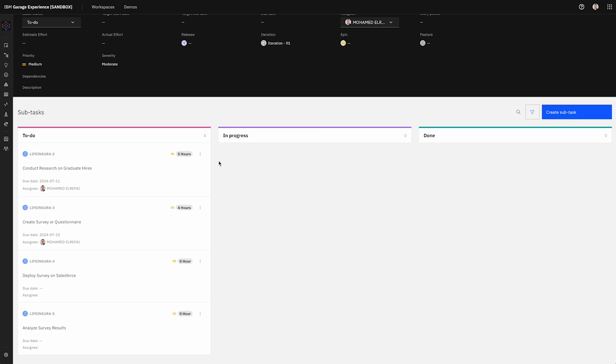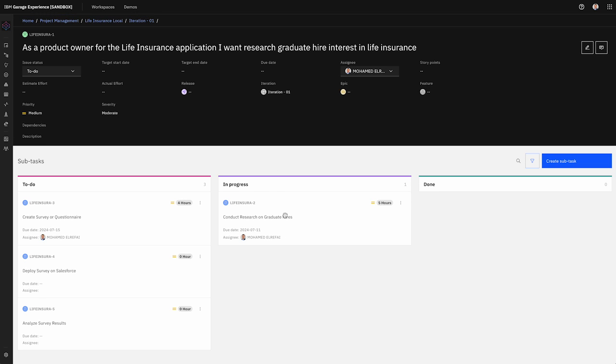So once we have this and we assign all the user stories, basically when you do daily stand-ups, the different members of the squad are either taking user stories or activities and tasks and assigning them to themselves. And then they're also updating the progress. So if I start to work on something, I'll put it in progress. And if I'm done with it, I'll put it in done. And that's how the system will start tracking progress and how things are happening throughout the system. Again, as you can see, this is full product management of these activities.